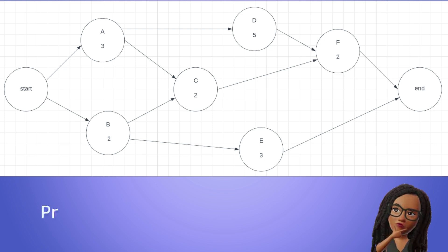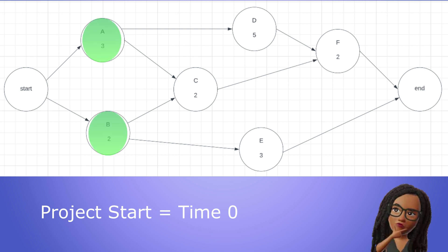It is best practice to assign the start of the project a time of zero. It doesn't matter if we're measuring in days, months, or years. Since our starting activities do not have to wait on any predecessors to start, their early start time is hence zero. So let's fill that in for both A and B.